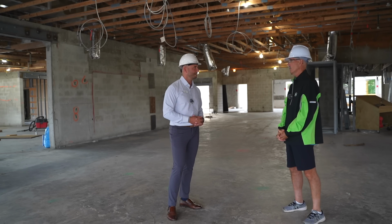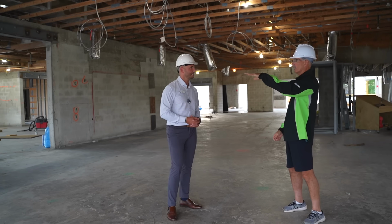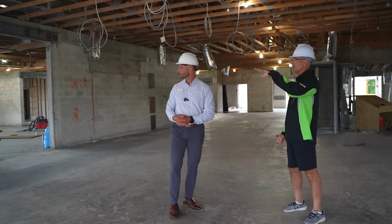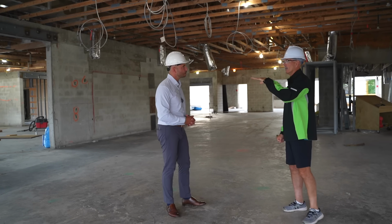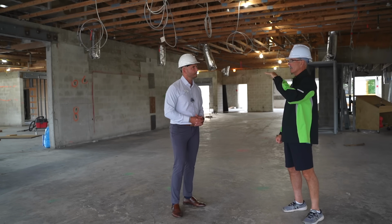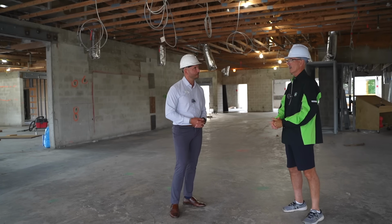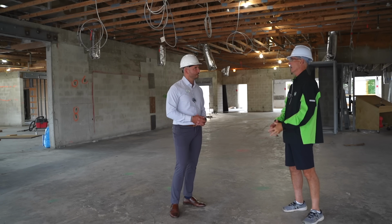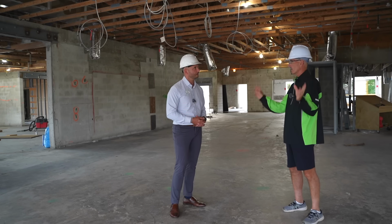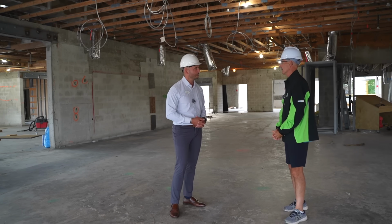Plumbers and electricians continue. They're working inside, they're working outside. The last pour of slab is all the new kitchen areas, the main electrical room, the new bathrooms that serve the pool cafe and the swimming pool area. All that's been roughed in. The poly's down. We're ready for pour tomorrow if they want to, but I'm not sure with the rain. But we're getting ready to complete that section of pour. So that finishes all the under slab work. It's all roughed in, stubbed up, capped, labeled, pull strings, the whole thing. So looking good.